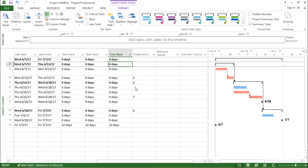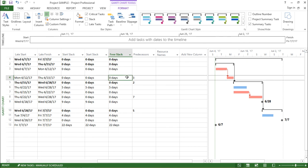Now let's understand what is Free Slack. Free Slack is the amount of time that a task can be delayed without delaying any successor task. So basically if the task has no successor, it is the amount of time that a task can be delayed without affecting the finish date of the project.